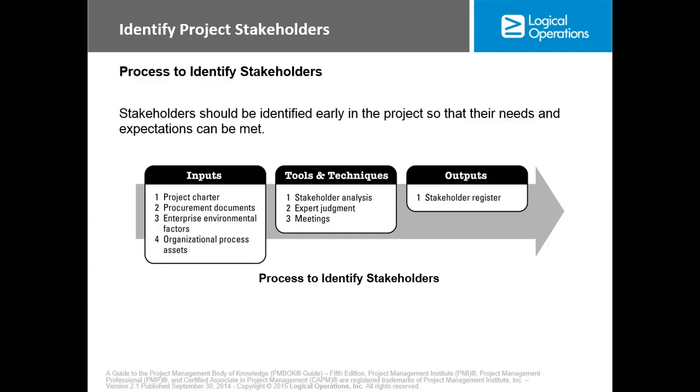Maybe they bought a vehicle that they used to supply water to the inhabitants of that village or community. Now, when this philanthropist is coming to build pipe-borne water infrastructure for the community, it is a good thing. But the persons who have been supplying that water automatically become stakeholders to that project, because the outcome of his pipe-borne water project will affect their business. So they automatically become